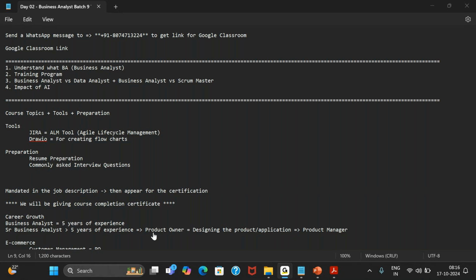But if you are meeting with stakeholders and documenting your requirements and giving them on time, then no one will question. Like usually in the current sprint, I'm working on preparing stories for one month after the sprint, not for the next sprint, the sprint that will come next month. Why? Because I'm building the pipeline month by month. So usually in September, I will work on stories that my team has to do in October.